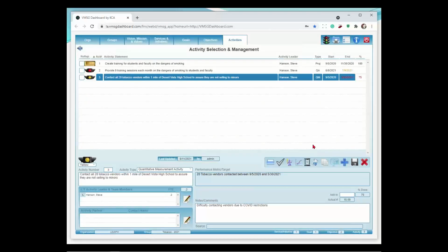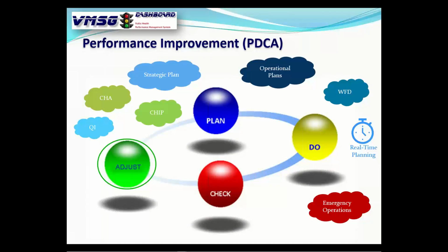So now back to our PDCA cycle. So at this point in time, the adjustments. The adjustments come in 4 different types. The first one you saw is no adjustment necessary because everything's working to plan here. The second one would be, does it make sense to adjust the plan? So that's kind of a decision process that you'll make based on the surrounding, if you will.